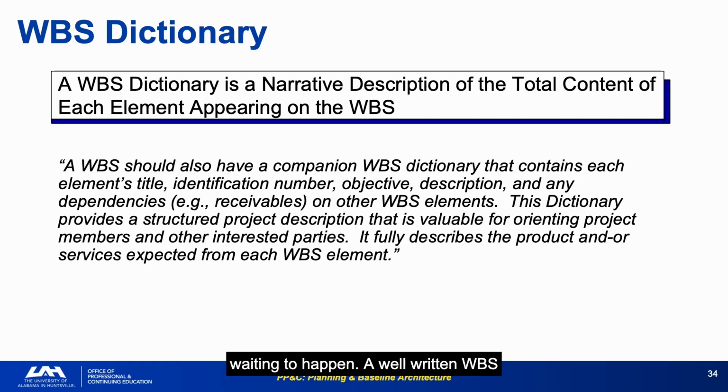A well-written WBS dictionary defines scope, interfaces with other WBS elements, and management intent for each deliverable. When it is missing or superficial, control account managers disagree about who owns the work, and that disagreement surfaces as a cost variance. During an IBR or peer review, reviewers will ask control account managers to explain the scope of their accounts. If the managers cannot answer from the dictionary, or if the dictionary doesn't reflect the actual work plan, the baseline lacks credibility.